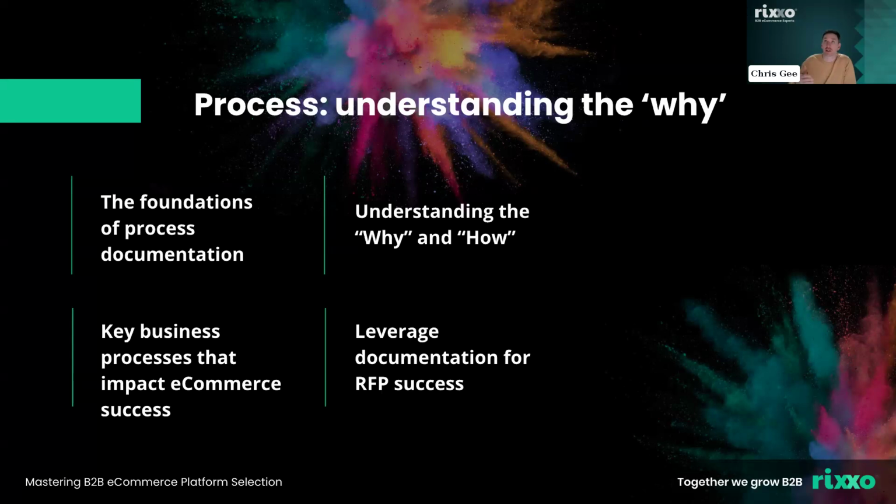The next biggest challenge in our ecosystem right now after platform selection is customer adoption. And if you've taken the time to document how you're running your business today, the effort that it takes to convert that documentation to the new method is much smaller nearer the end of the project. And that's going to enable the change for people and processes far more effectively, because it forms your training paperwork. It creates your customer adoption model. So it has a knock-on advantage. It doesn't just help this part of the project go more smoothly, but it will speed you up at the other end when you want to come out the gates racing ahead to get that website live and everybody using it. That's it.